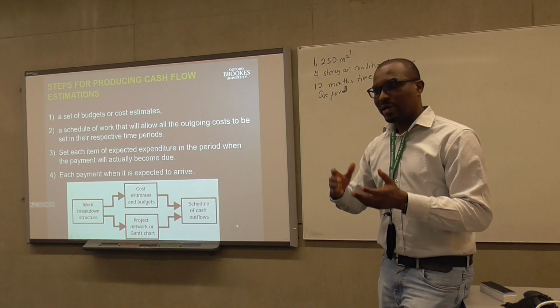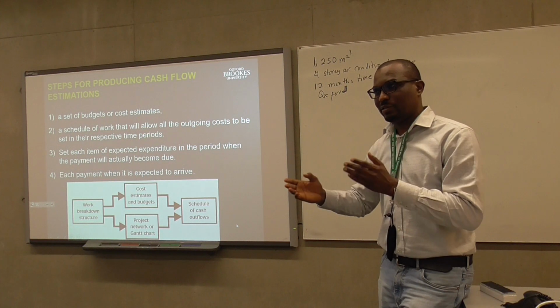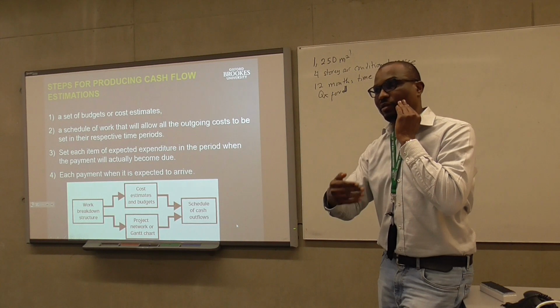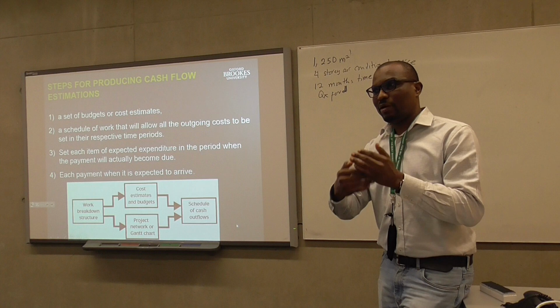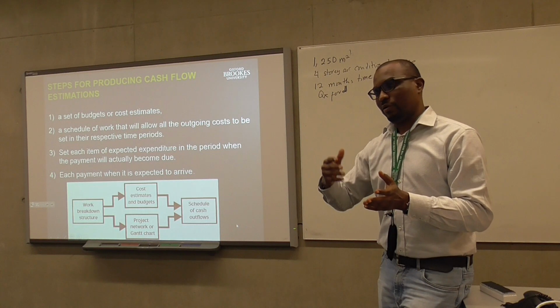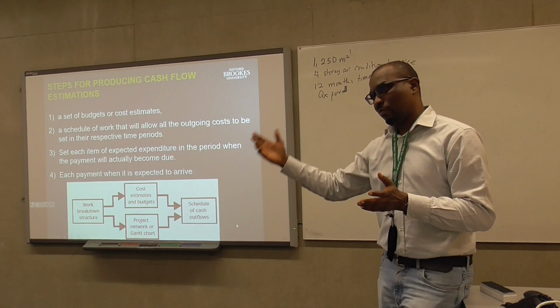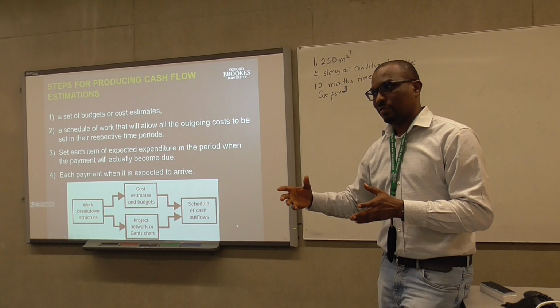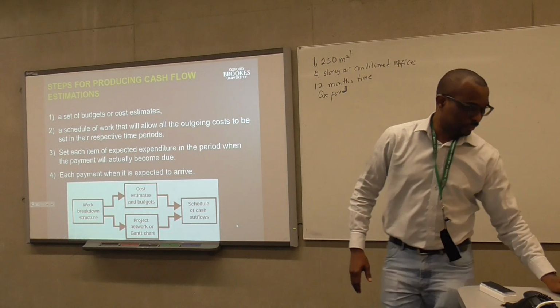So the monthly or regular payments are done so that it helps the contractor in managing its cash flow. Because if you pay the contractor regularly, the debt that the contractor will take from the bank is very minimal. Okay, I get it now. It's clear to me now.